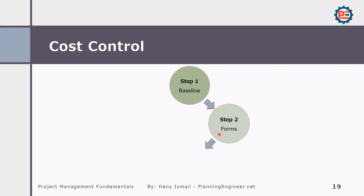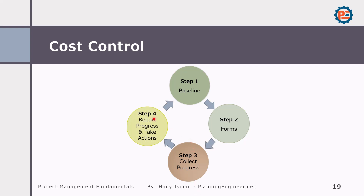The baseline here means an Excel sheet containing project BOQ items linked to the project activities, with direct costs and indirect costs so you can monitor easily. These forms help you fill in the fields where you collect progress, then report progress and take actions. It is a very simple process once you understand how it works.